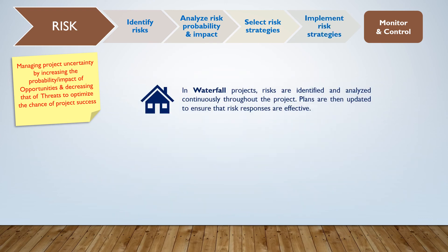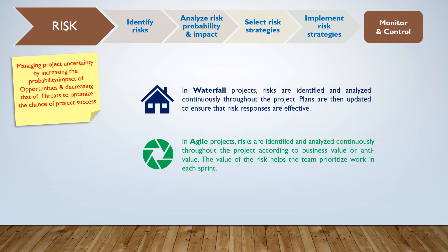In waterfall projects, risks are identified and analyzed continuously throughout the project, and plans are updated to ensure that risk responses are effective. In agile projects, risks are identified and analyzed continuously throughout the project according to business value or anti-value. The value of the risk helps the team prioritize work in each sprint.